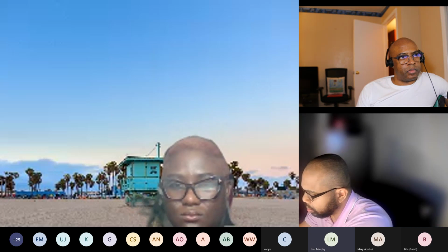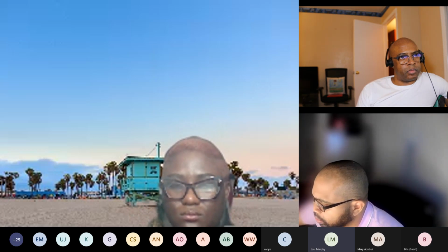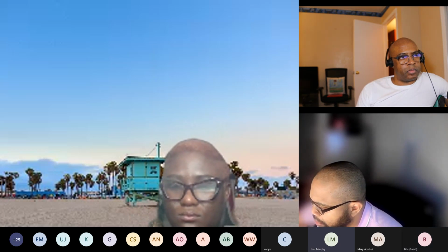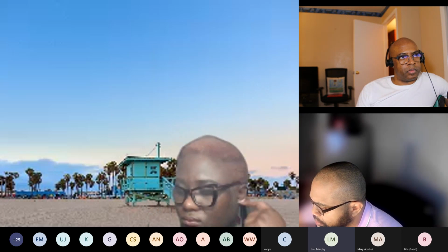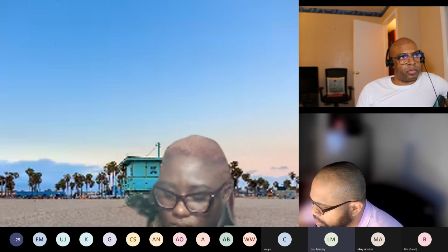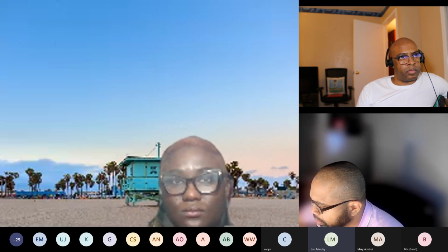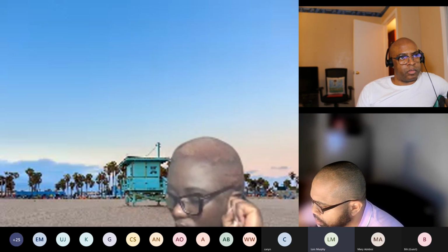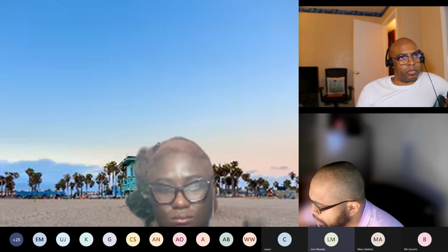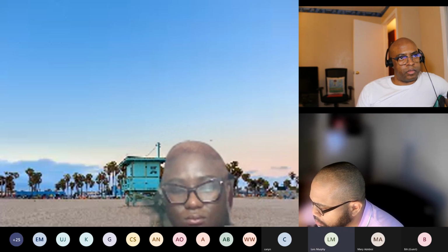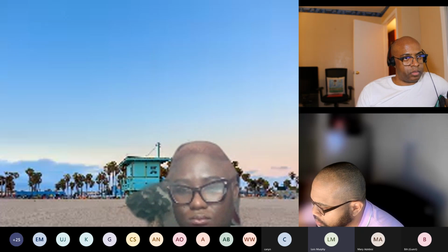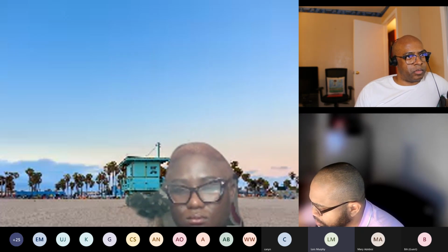And then in the intervals of the day, based on how it goes, sometimes in my organization, I assist my release train engineer. She has a few tasks that she always hands over to me, like preparing the ART sync. The ART sync is on Confluence, where I ensure that all the teams have put in their information before our ART sync meeting, which is basically like a daily stand-up too, but for all the teams in the ART.